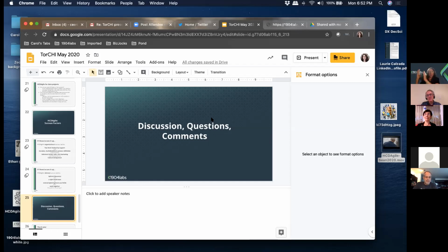So we do carve it up to be able to block it into sprints, but we never lose that spine. And every sprint we come back to that story map as a team and we review it, and we see if it's changed or if any of the priorities changed. So I would say that's probably the number one thing that helps.